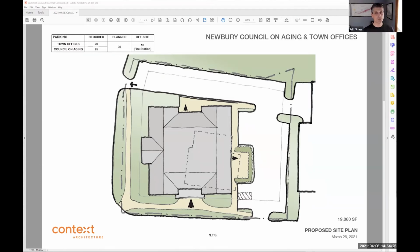Yeah, so we did reach out to a cost estimator and said, for a new building on this site, 2 stories, roughly the type of construction we're doing. And he gave us a ballpark today, spring of 2021, of 475 to 525 per square foot.